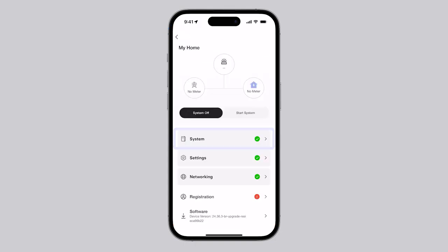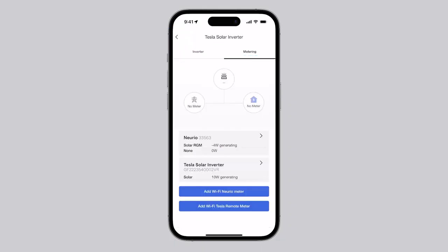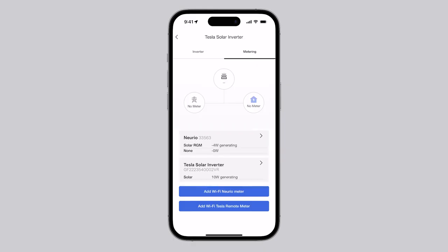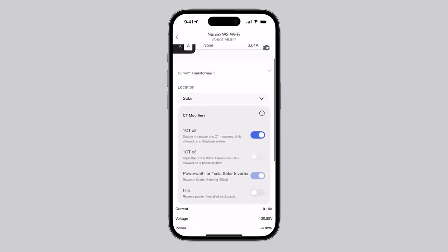Moving on to the system tile, there are two tabs: Inverter and Metering. The Metering page displays all meters that are connected to the system, including the factory paired energy meter. Select the factory installed energy meter and configure each CT for its intended use.